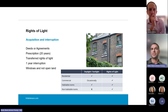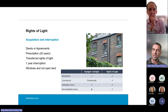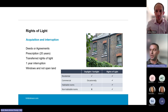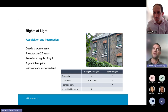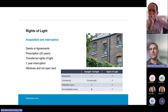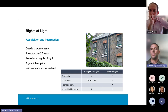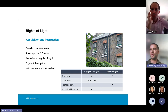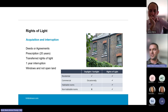There's also another way to acquire rights for a property that's less than 20 years old, through what's called transferred rights — where the rights transfer from the demolished building across to the new building where the windows are built in a similar fashion to the old ones. You can lose those rights through interruption or abandonment. Abandonment is quite hard to prove. One year interruption is what we usually work with, as there's a mechanism called a light obstruction notice which can stop neighbouring rights accruing. The right to light is connected to the window — the prescriptive right — so with NHS sites surrounded by open fields with no buildings, there is no right to light to that open land.